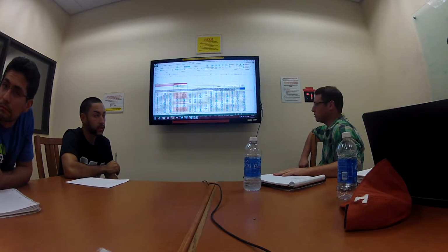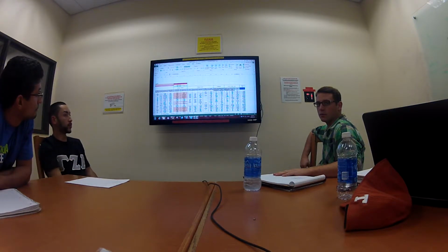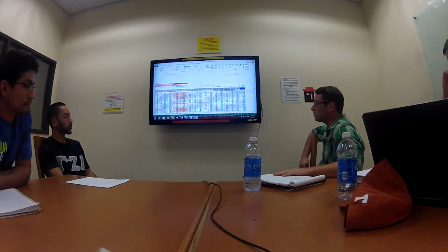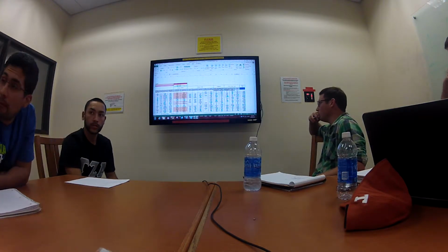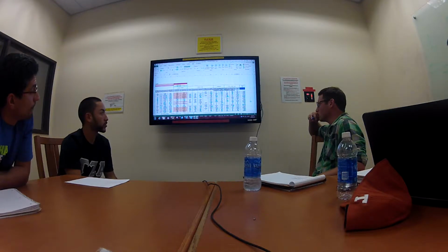But you still put the 35% on it, right? Right. Well, you can pull profit margin out of them too if you want to. That's kind of up to you. It's risky, because if you make those bid items super cheap, and then they say, "Oh, well, we want to do double that quantity of that bid item," then you can be in a bad spot. So anyhow, we've gotten into the weeds on this sheet.